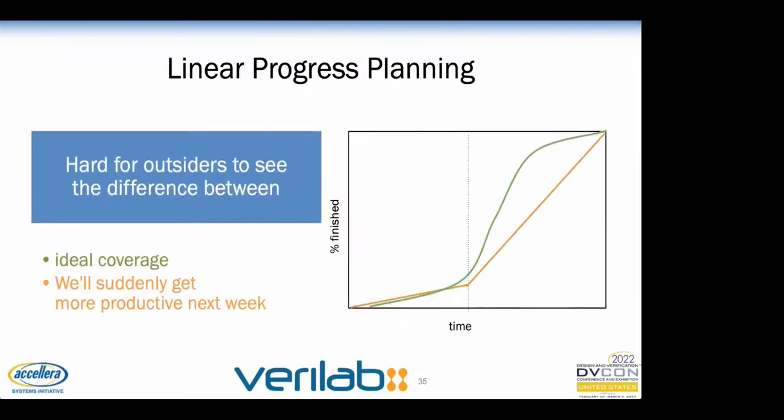Where we run into problems is when we try to use those graphs as prediction or tracking tools. They're always drawn as a monotonically increasing curve, whereas actual reported coverage may have drastic spikes and dips as more coverage points are added to the total. In real life, we have to deal with changes in the denominator of a coverage percentage number.